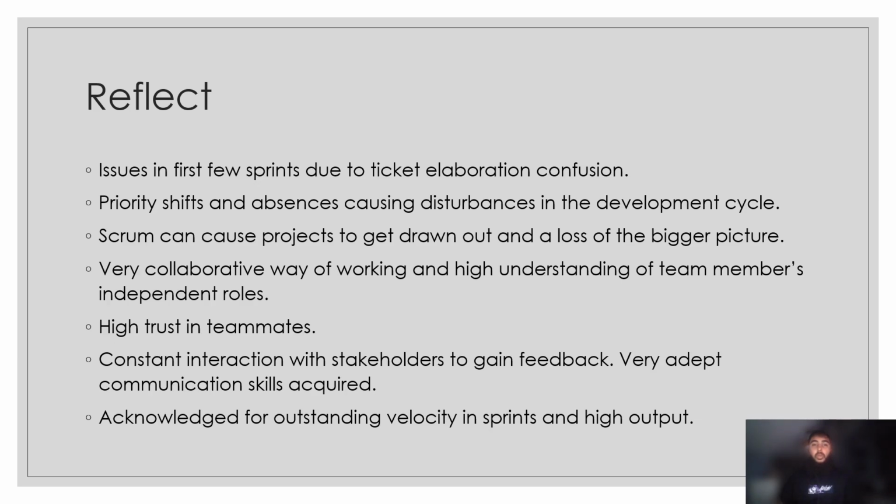And then also what we had was, we also had massive issues with priority shifts and absences, because in the NHS it's quite a volatile working environment, and there's obviously a lot of shifts within sort of what teams need to be working on, and so we would often be asked by management to change what we're working on to fix any urgent issues, and also because sometimes team members would be told to help other teams or to go away for a sprint. An example of this was our technical lead had to go help another team for a sprint, and also there were absences like annual leave or sickness, which I had not really accounted for as well.